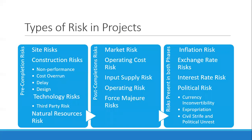There are several types of risks in projects. Risks can be classified into three categories: pre-completion risks, which are inherent before a plant is completed; post-completion risks, present after completion of the facility; and risks present in both phases, pre and post-completion.